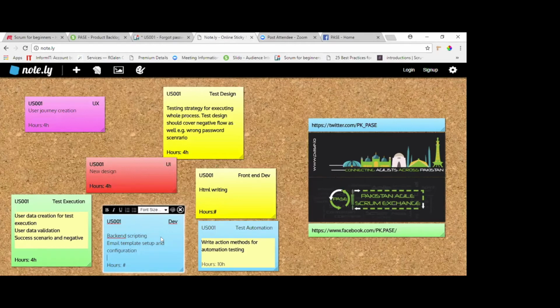So almost 8 to 10 hours of work involving each resource. Let's say the UI developer takes 4 hours minimum and 8 hours maximum, and the server developer takes 4 hours minimum and 8 hours maximum. So the maximum total time I need is 8 hours of development and 3 hours of unit test writing.